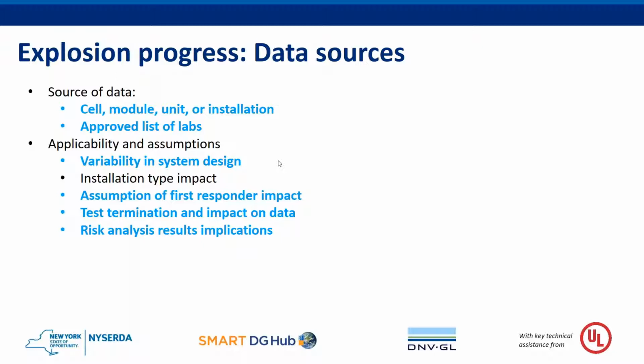What was under discussion was that if a laboratory that has been approved to provide this testing does an analysis and determines the worst case scenario configuration. For instance, a lot of different systems have modules that are quite similar but have larger capacity, or racks that are quite similar but can have more modules in them. In that case, it has been determined that it would be acceptable to test the quote-unquote worst-case scenario.